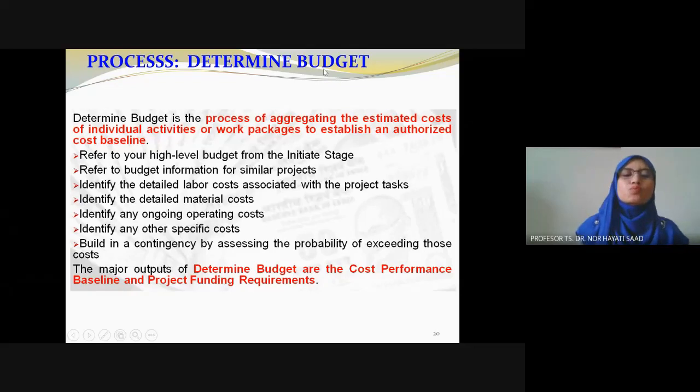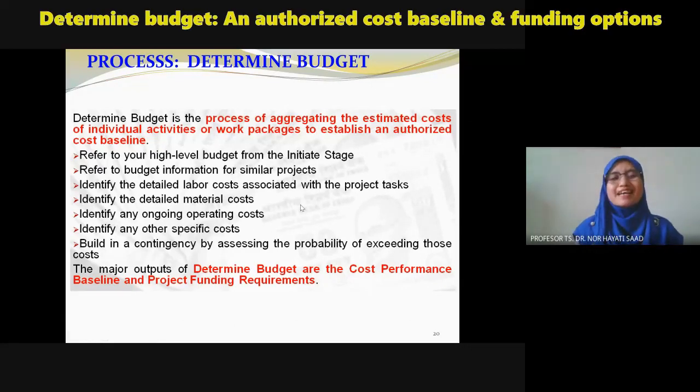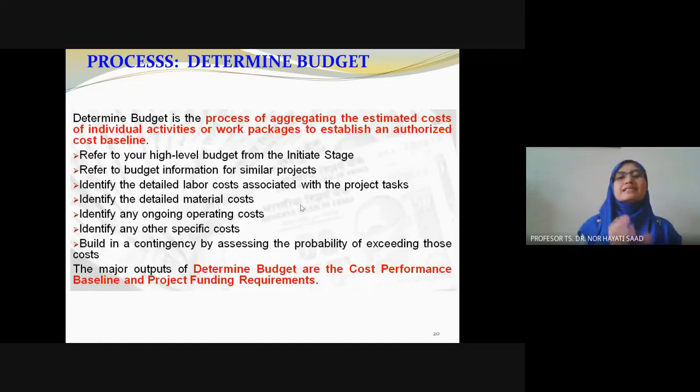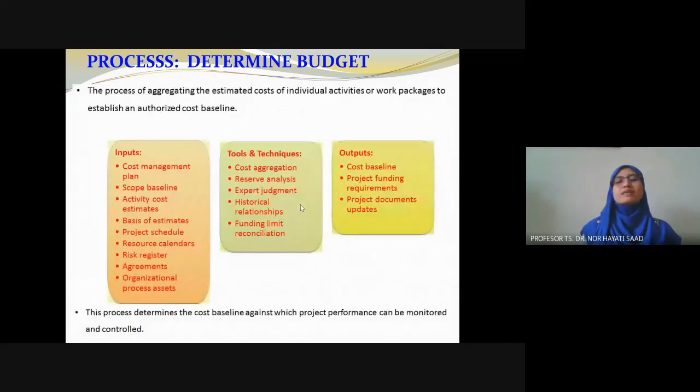Once we have calculated this, of course, since we are doing business, we need to put in a certain margin for our investment. Some companies put 10% or up to 30% as a mark-up, deciding how many percent they want on the return on investment. So have a look later.